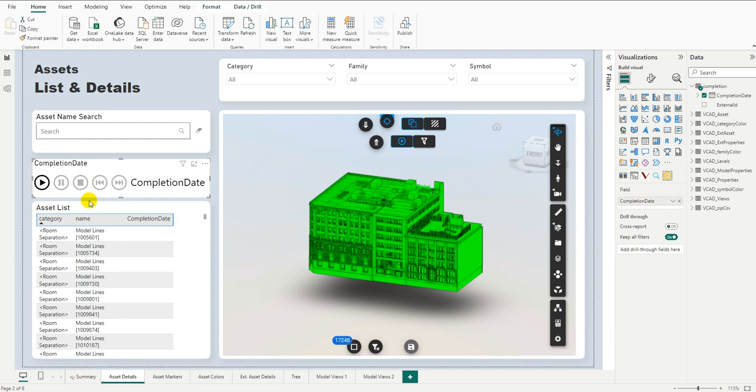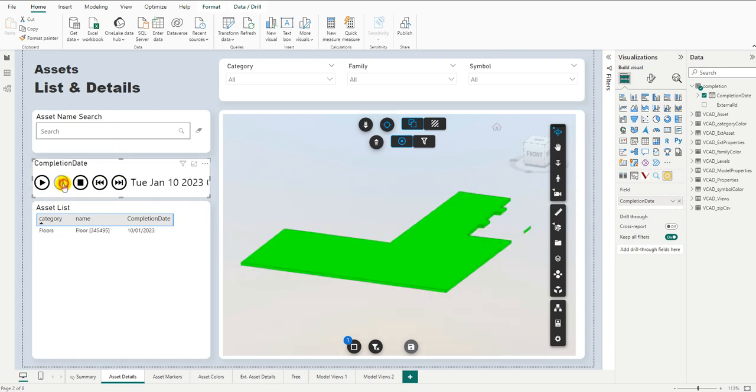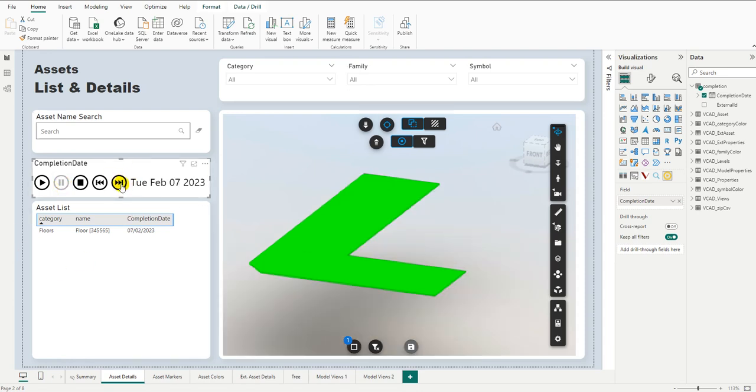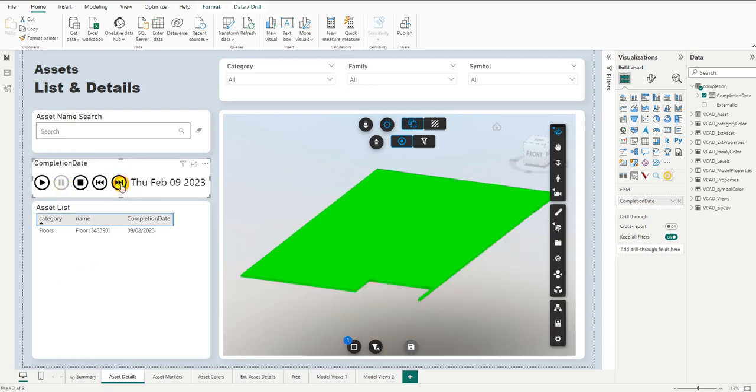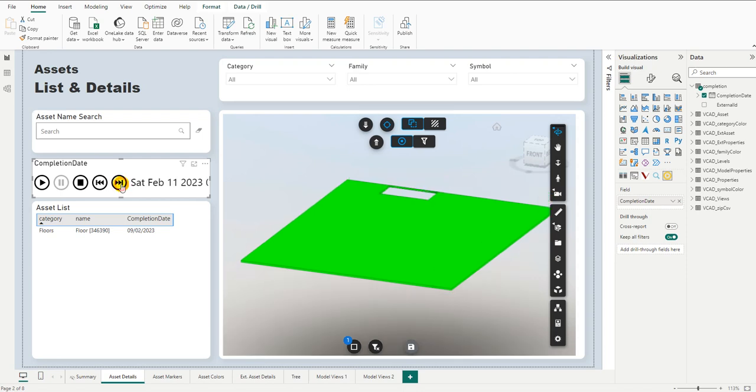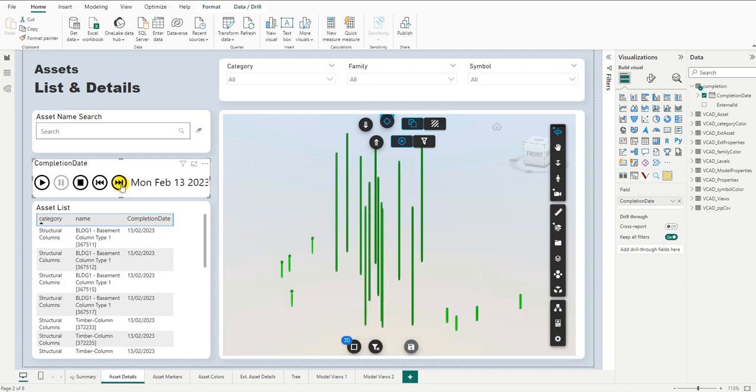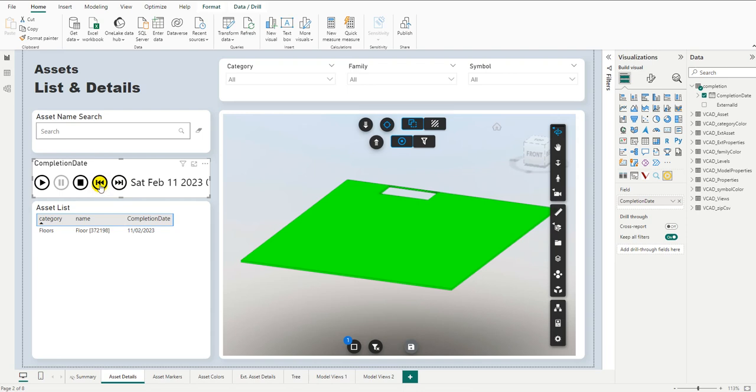So let's go ahead and let's stop this animation. And if we think about what we actually want, what the play axis is now doing is it's going through the dates and for each date, it's given me the objects for that specific date. What I instead would like is for it to go through the dates and for each date, give me the objects for that specific date and for any previous dates as well.